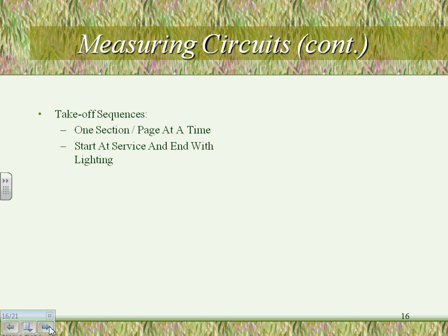You can start one section at a time, one page at a time, E1. You start from E1 all the way to E12 in our project. Start at the service and end with the light. So that's another sequence: start at the service, end with the light. A second sequence, the one that we used in this project, guys, we start E1 through E12. We come through E1, there's nothing on E1. But I usually ask the students to list these, E1, and then we go by sheet: sheet and system.